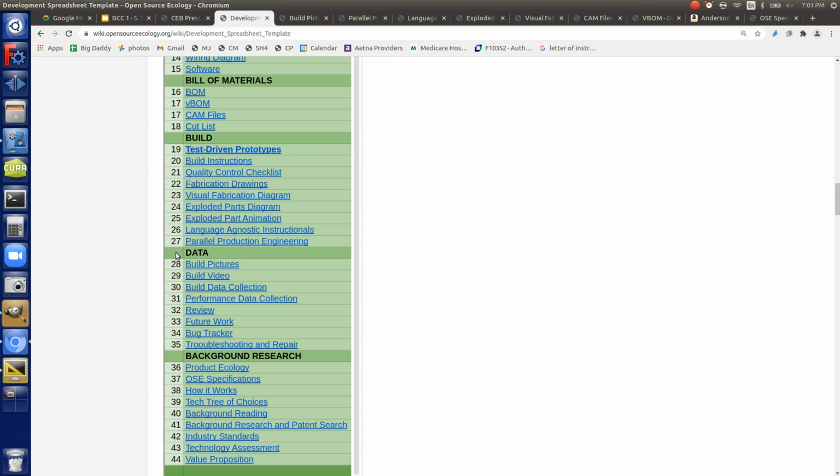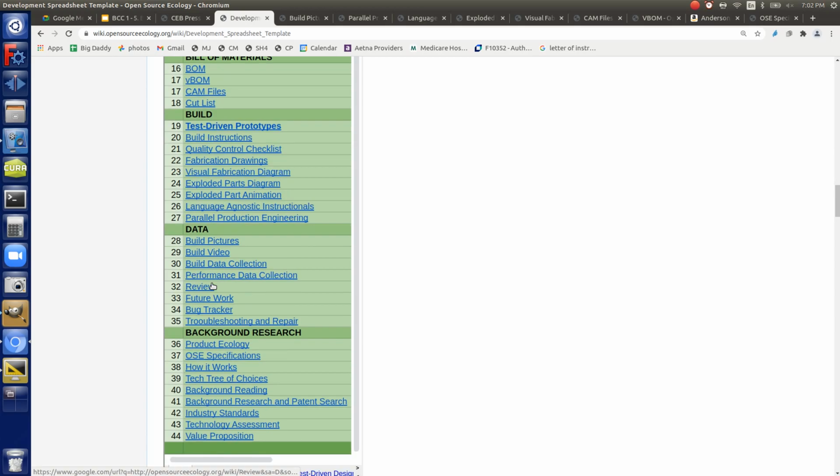And he said, yeah, that's okay. So we know we would have passed it. So then we go to the actual build inspection, and because we had that review, we know that we're actually going to pass it, and we're not going to have rework, because we reviewed our design, reviewed at every step.